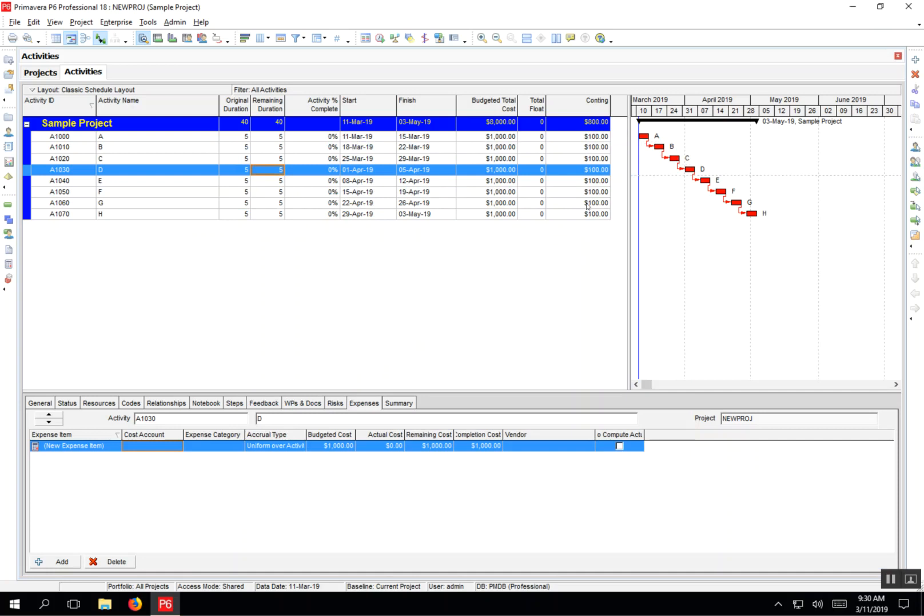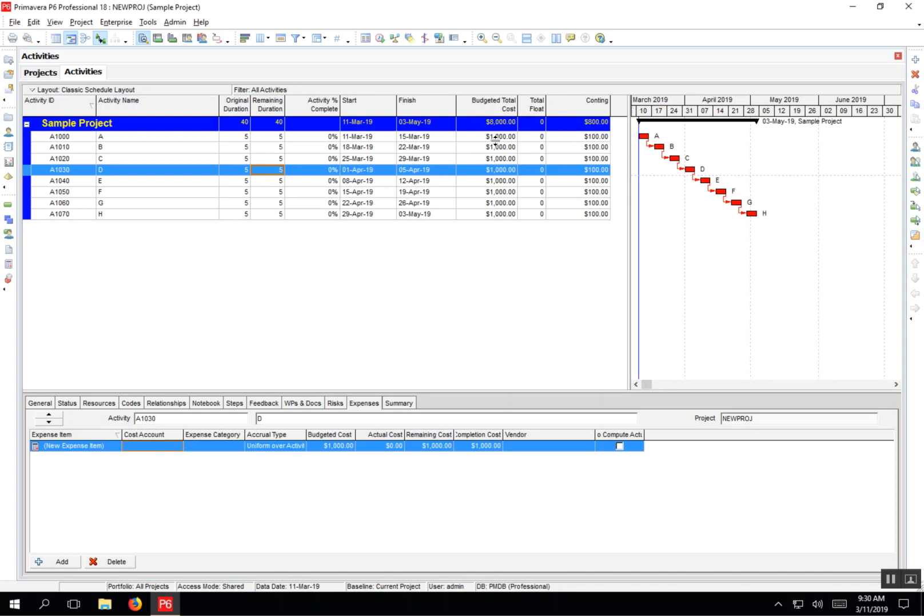$100, $100, $100, $100. If I wanted to add another column called total—maybe bill rate—I could create a user-defined field called bill rate and have it equal the sum of the budgeted total cost and the contingency. Or I could just call it bill rate and have it equal to budgeted total cost multiplied by 1.1, which would yield the same answer. Thank you.